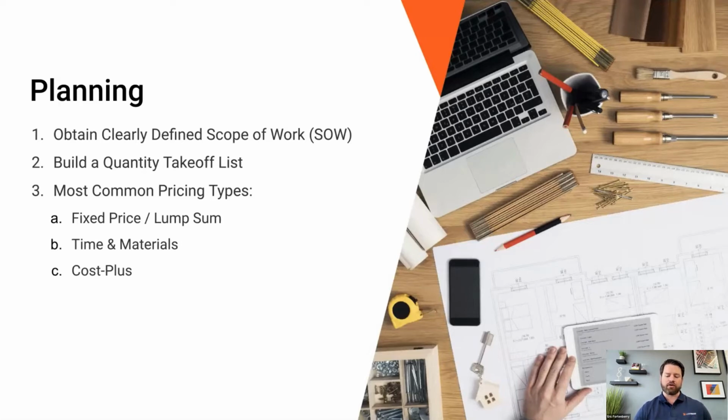So learning your numbers and understanding the cost for the job and what's going to be required to successfully execute on that job was extremely important. And one of the things we did is that we forced the guys to build out that budget first before working on putting together the pricing and the numbers. So I'd be remiss to not hit on the fact that you've got to have a very detailed scope of work entering into every single job.